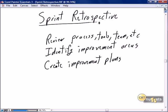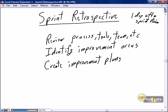Our final meeting of each sprint is the sprint retrospective. The sprint retrospective should take place one day after the sprint review — just a little breathing time. If we complete the sprint review at noon, we don't want to immediately go into the sprint retrospective because we're still riding the high of getting acceptance of done on all those stories. Take a half day to make sure we're not riding that high before moving into the retrospective for calm, quiet thought.